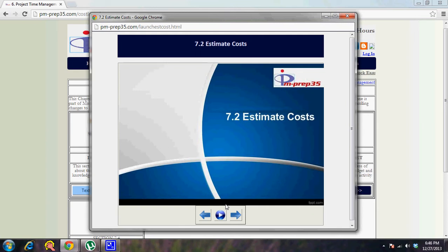Then you have the risk register, wherein you can see what the contingency risks are, and then you can account for that. What is the cost that you allocate? Because contingency reserves are a percentage of your ultimate project baseline. But there is one more thing called the management reserve, which is allocated for the unknown unknowns, which you can't even expect what could be the risk that might come into the project. You can't anticipate certain risks like a catastrophe. So those things are not part of the baseline, but then you have to raise a change request to make it part of the baseline.